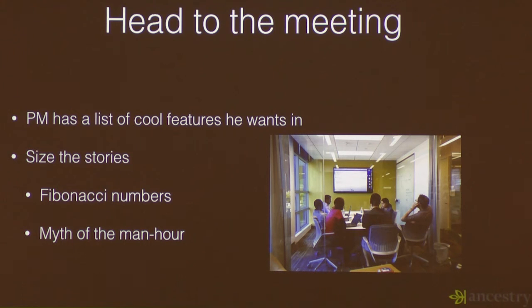So your PM will go, okay guys, let's sit down and talk about what we're going to work on. And so what we'll do is we'll size the stories. Now what this means is you have a story, say it's a feature, say you're adding a whole new view, a whole new settings page, maybe you're turning on the microphone on the app, who knows what you're doing. But anyway, the PM, he's not a developer. Maybe he came from the developer cycle, but he is not a specialist in Android. So you have to tell him how long, or not how long, but how much effort it's going to take to get that job done.